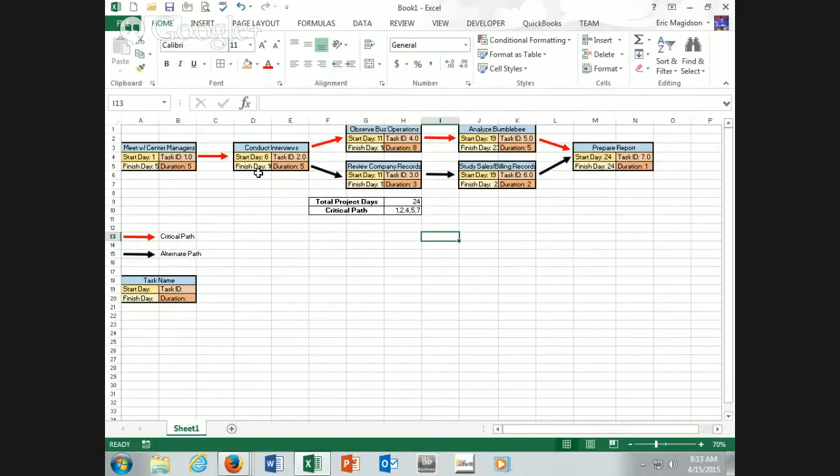The critical path should always follow either a top path or a bottom path. I've read the suggestion is the critical path should always be on the top, so someone should be able to quickly ascertain what the critical path is just by looking at each task on the top, even if there are tasks done sequentially.